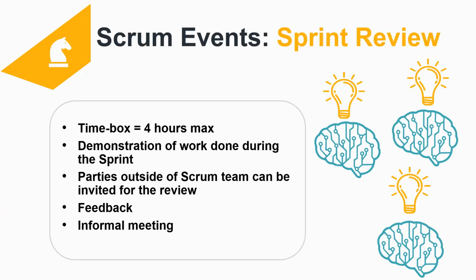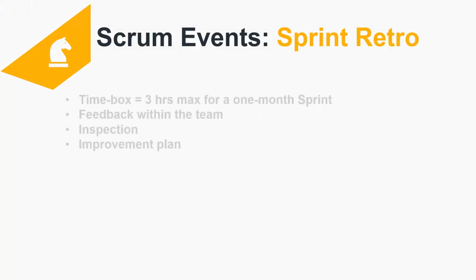So the result of the sprint review is a revised product backlog that defines the probable product backlog items for the next sprint. The product backlog may also be adjusted overall to meet new opportunities, which can also be discussed during the sprint review.